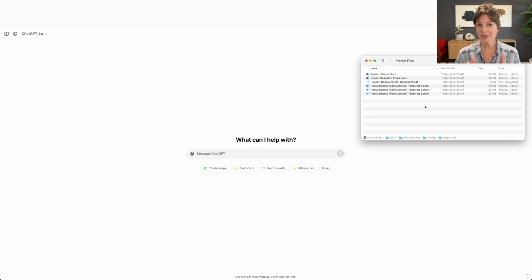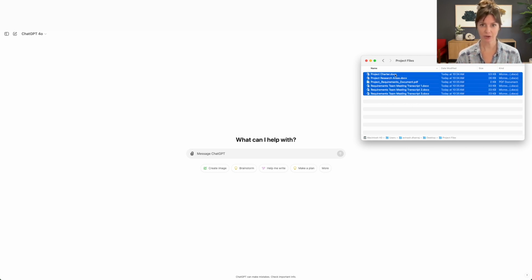So you, being the very diligent and savvy project manager that you are, may have a lot more documentation than I have, which is great. And since we have a lot of documentation, we will chain our inputs into the LLM, meaning feed it our data incrementally over several prompts, because the quality of an LLM's output can diminish if we provide it too much info at a time.